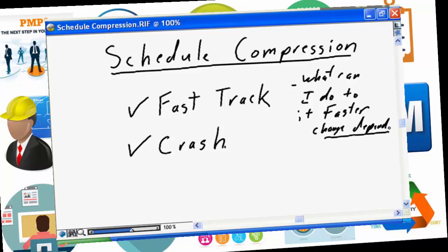If you look at the various dependencies you have in your network, if you say that C is dependent on B and E is dependent on D, are those in fact true mandatory dependencies? Again, when we were originally setting up the dependencies, I told you to focus on mandatory dependencies, but are they true mandatory dependencies? Based on the additional information that you have at hand now that your project is well into delivery mode, are these in fact true dependencies, or can I remove some of the dependencies?